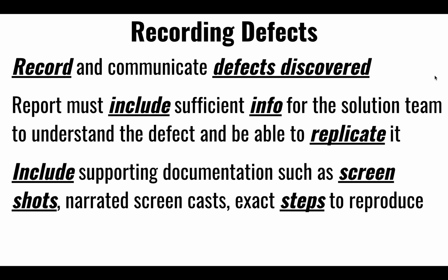If you identify something that is wrong or used to work but no longer works, we're going to ask you to identify these bugs and create a JIRA bug, and either assign it to somebody if you know who's responsible, or at least leave it in the backlog, so that come next sprint,